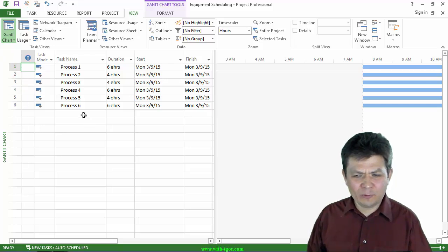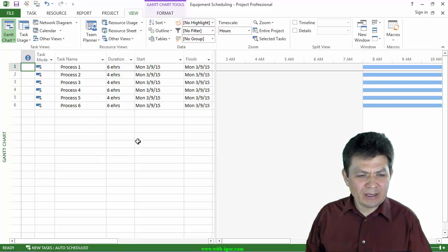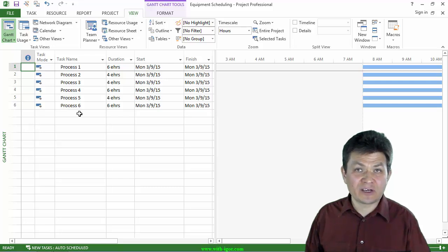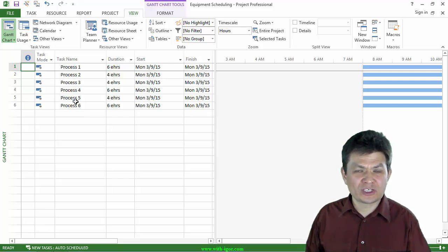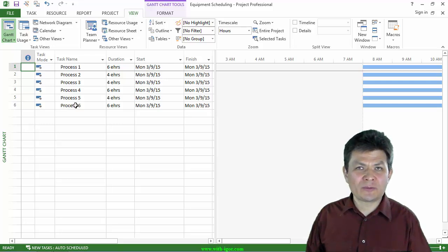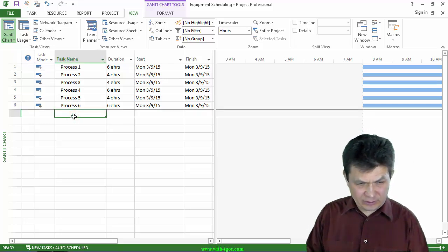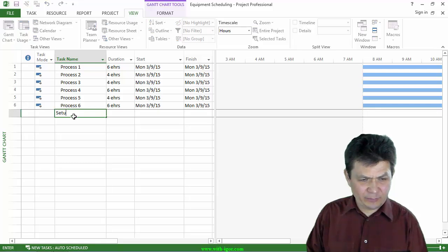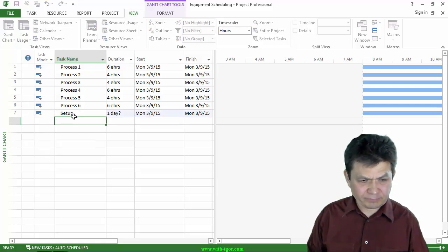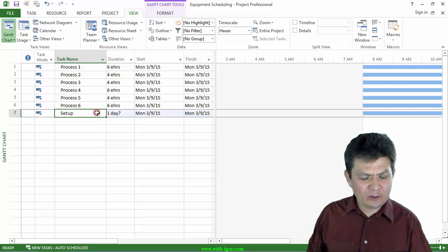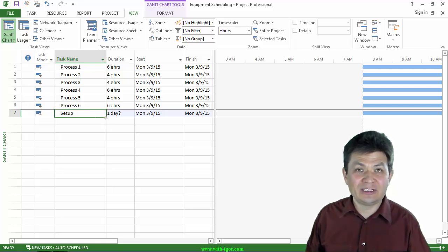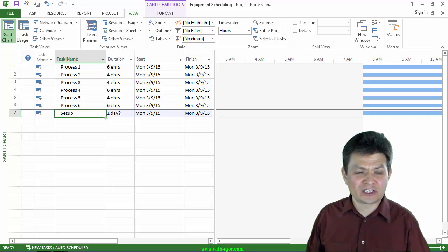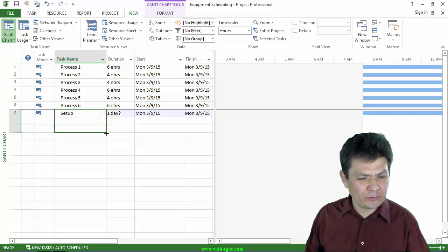And what I will do here, I will create a trigger task for each one of these process tasks. And the trigger task will be something that a human does. I'm going to call it setup. So I'm going to call it setup, create a task. And I will make several of them. I need six of them. I need a trigger task for each of my processes.